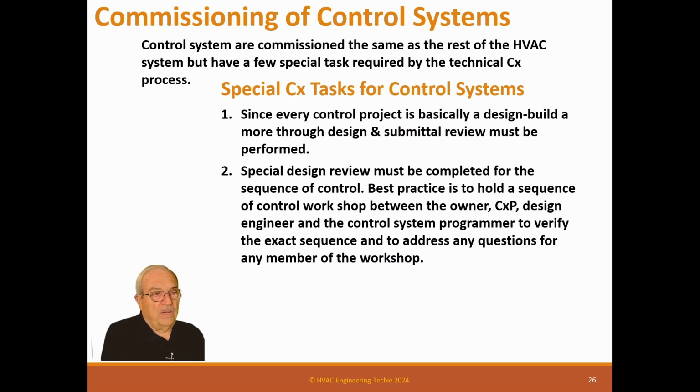But if you have a job that's really complicated and you've reviewed the sequences and you have a lot of questions, you're not quite sure how this is supposed to work, it's really important to put a workshop together. Because what happens, having been a control contractor, the programmer sits down and looks at these things and says, well, I can't actually do that. I don't know how to do that. So we'll do it this way. I've done it this way before. And they'll make a change and not tell anybody, because who's going to know? Are you going to go in and read the code? No, you're not going to read the code. So that's why we have a workshop.